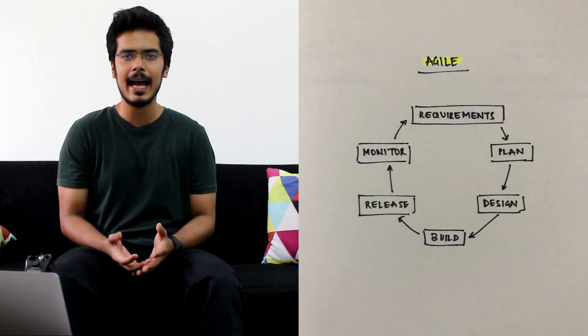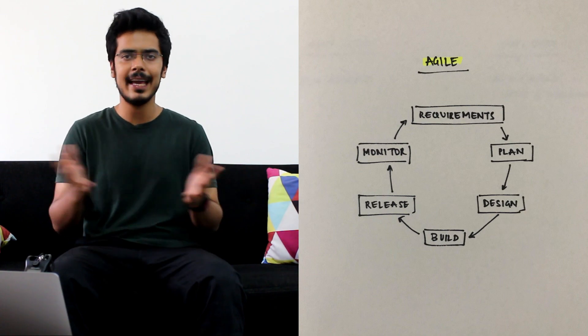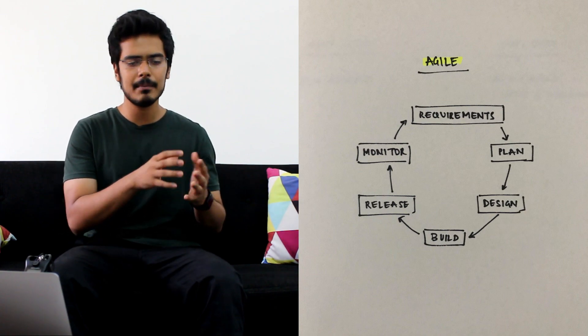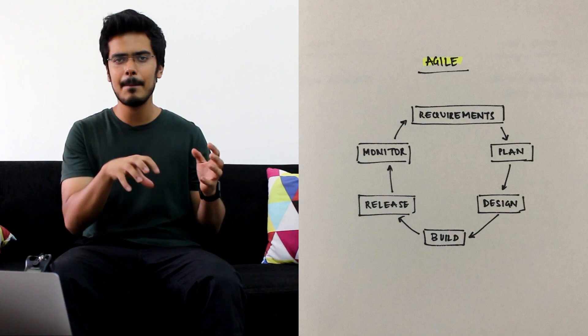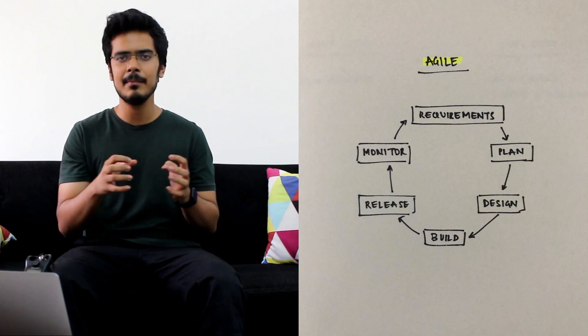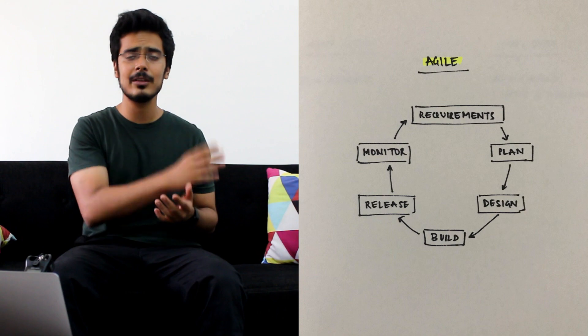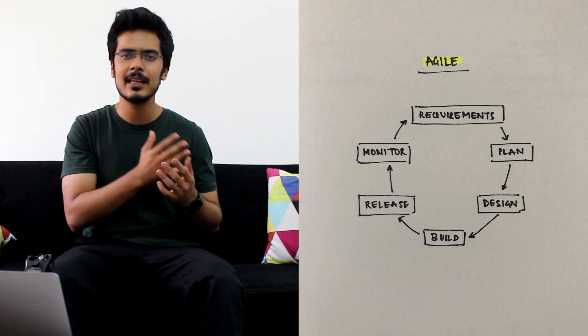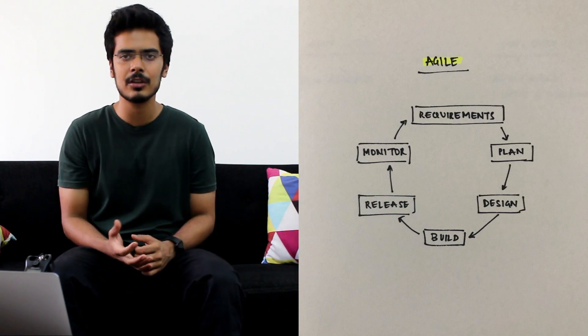Whereas if you're trying to make an app, let's say product X, there you can basically do the requirement gathering and planning in shorter amounts of time, release something, and then go back to the blackboard, gather more requirements and keep adding updates to your software.